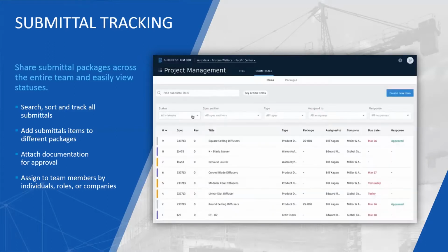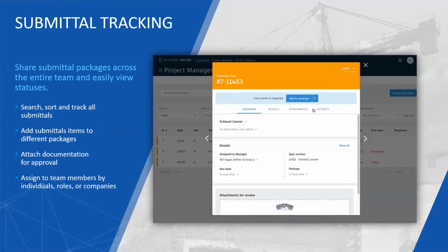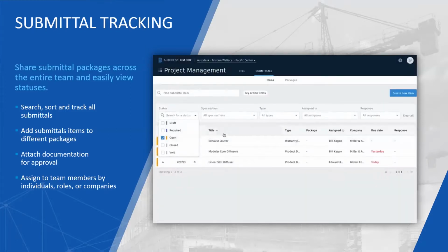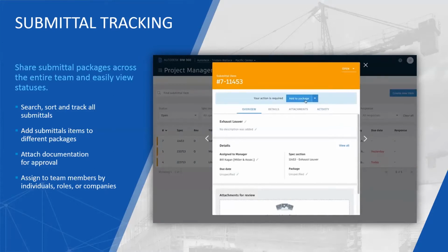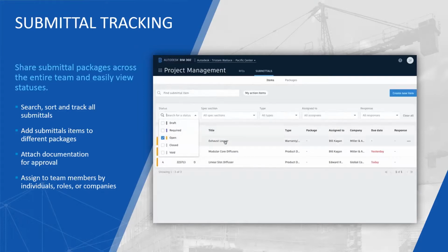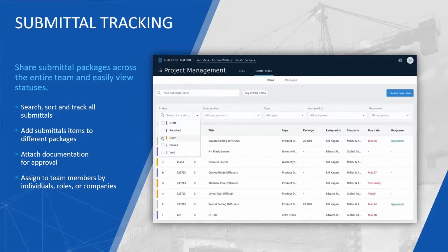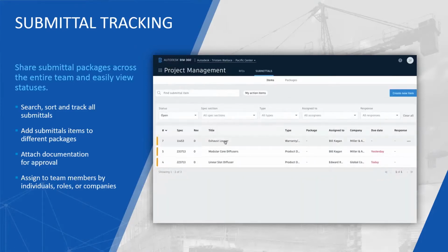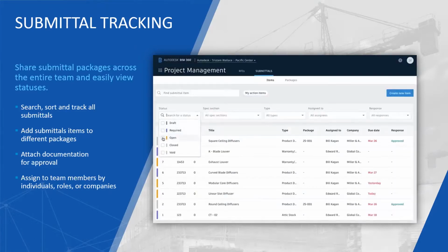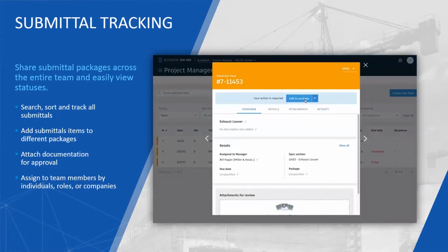So very important there. And then being able to ensure the continuity of data across the project lifecycle. So again, being able to connect your project records to 2D and 3D locations, being able to connect workflows across the project lifecycle, and this provides insight and accountability as well. So we're able to look at reporting on projects: how many design issues have come up on site, how many snag issues have come up on site, and we're able to pinpoint those to a particular subcontractor or particular individual or particular contractor on site. And this is all linked back to your 3D model as well, and back to your 2D files as well.